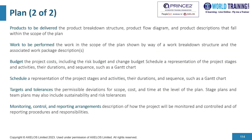Further, the plan document contains what products are to be delivered, including a product breakdown structure, flow diagram, and the product descriptions that fall within the scope of the plan. There is also a section on the work to be performed, shown by way of a work breakdown structure and the associated work package description. Budget covers the cost of the project, including the risk budget and the change budget. A schedule provides a representation of the various project stages and activities along with durations and sequence, such as a Gantt chart.